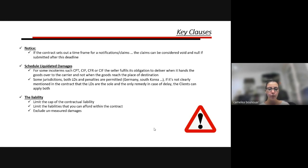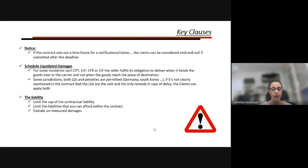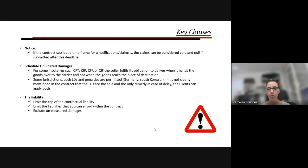Liability: also very important. Under the contract you need to cap your contractual liability. For high-risk projects, cap your liability, and when the customer requests more liability, ensure it's within budget. Exclude unmeasured damages — things you don't control, like consequential damages and indirect damages — which can be enormous and may not even be covered by your insurance. Exclude things not under your control.